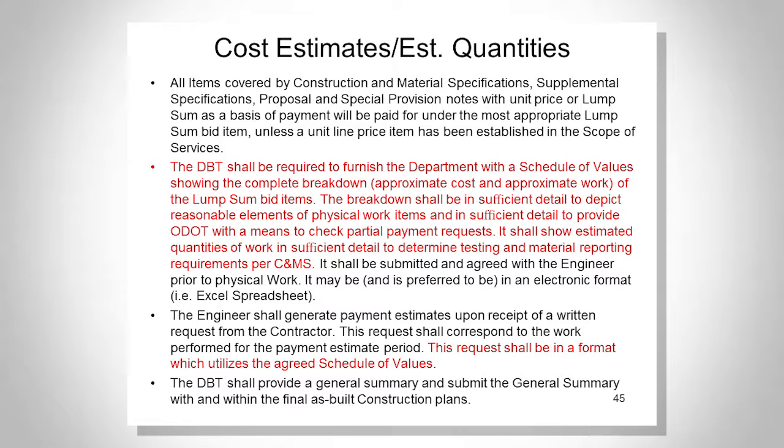So the idea is, if you make a payment every month, for that item you can go to your material sampling and testing, and for that month, for that item, though it may be incorporated into a foundation of steel, concrete, lump sum somewhat, you should be able to have testing on your material sheet to show a correlation to match up with your payment.